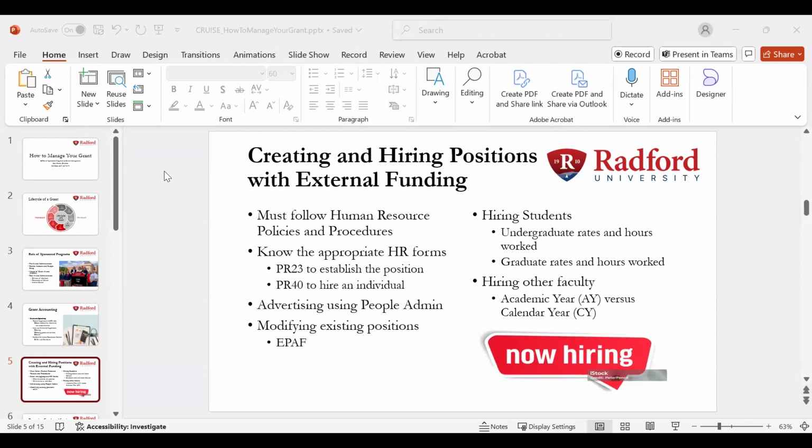On our grants, we mirror the graduate student workload, no more than 20 hours a week. They're here to concentrate on their curriculum or their course of study, not to be overworked. So you want to stick to those types of hours. Typically when we budget in students at the undergraduate rate, it's $15 an hour, no more than 20 hours. And whether you want them to work in the fall, the whole semester, the whole academic year is fine.